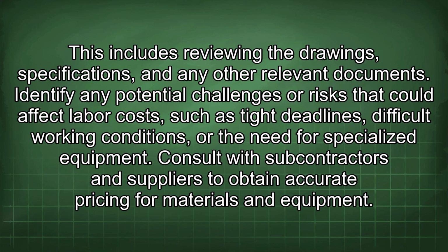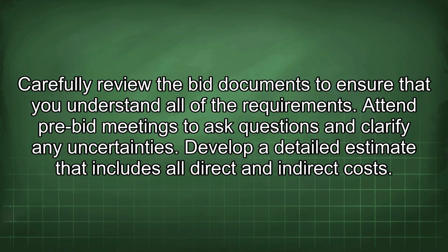Identify any potential challenges or risks that could affect labor costs, such as tight deadlines, difficult working conditions, or the need for specialized equipment. Consult with subcontractors and suppliers to obtain accurate pricing for materials and equipment. Carefully review the bid documents to ensure that you understand all of the requirements. Attend pre-bid meetings to ask questions and clarify any uncertainties.